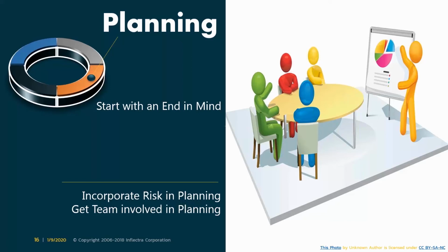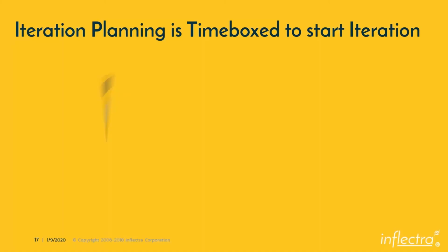So the product backlog has to be risk adjusted, and the team has to be involved in the planning, so they have to understand where we are going, so they are able to come back with all those value added stories. And in other webinars, I had talked about not only commercial value add stories, but also business value add, technical value add, and process value add stories that need to be added. The product owner may or may not be technical, and the result has to actually rely on the team to provide those kinds of additional stories.